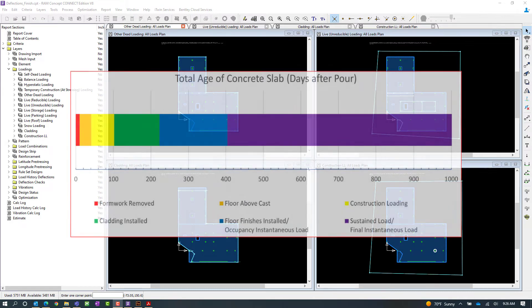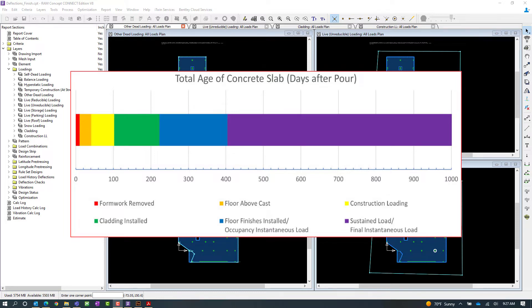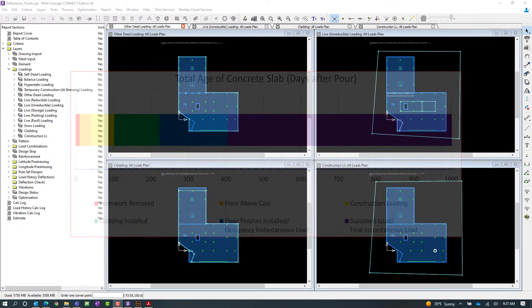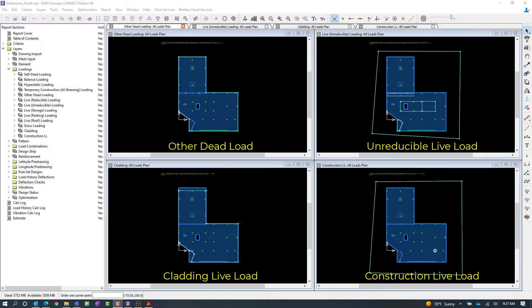Now for this structure we're going to assume that there are different stages in the lifespan of the concrete slab including when the formwork will be removed, when the floors above will be cast, when the cladding will be installed, and then the final lifespan of the structure. To consider those different stages in the deflection calculations we've gone ahead and set up our load cases and some load combinations to reflect those stages of construction.